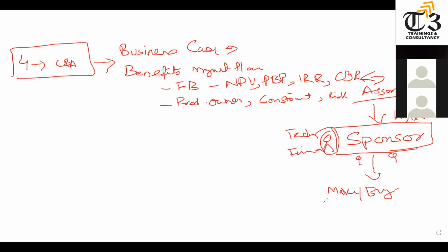And we will establish the source selection criteria, which type of sellers we need. So once you have decided, you will do the request for proposal, request for information, or request for quotation, which means you will submit the procurement statement of work, which is very detailed.